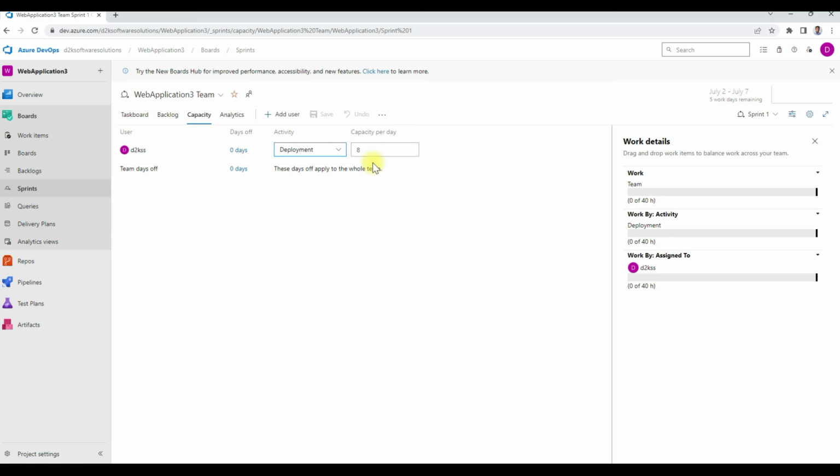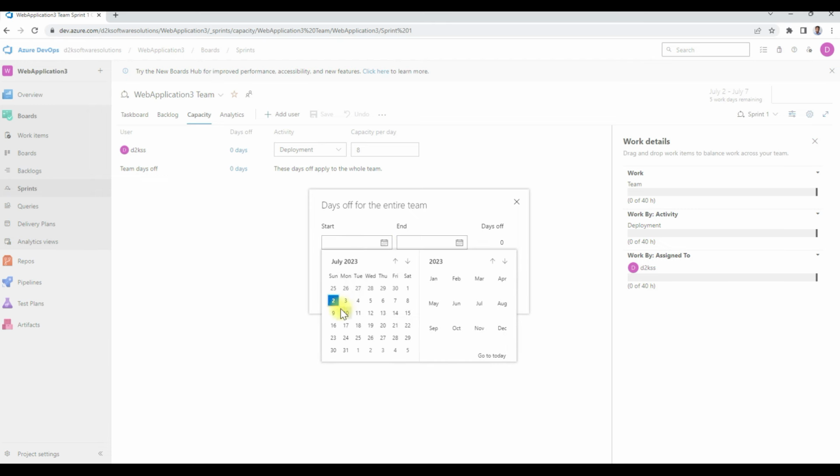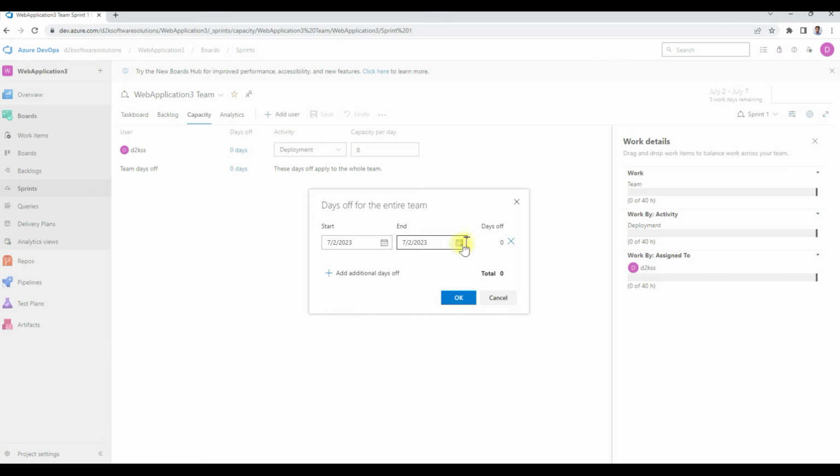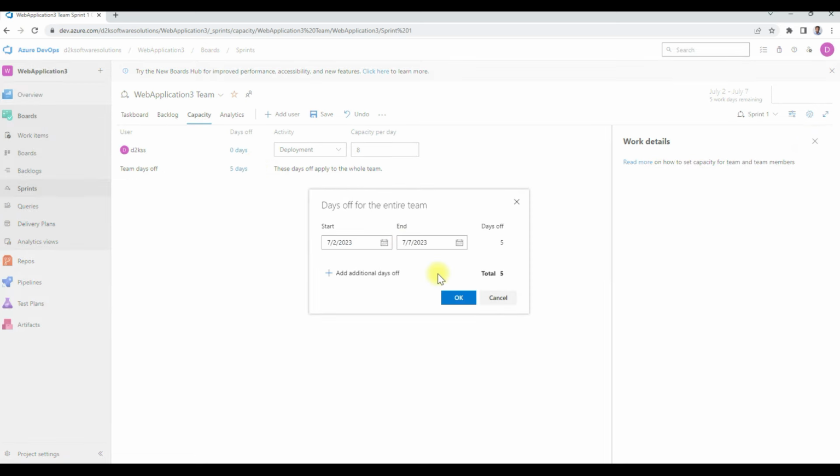And like the way you can add the number of users and you can plan the resource capacity. And here you can put the day off also. For example, if for a particular period they are not going to work or they are taking leave, you can put that day off. If you put that day off, then it will not show because there is no capacity to plan. So I will just take out this